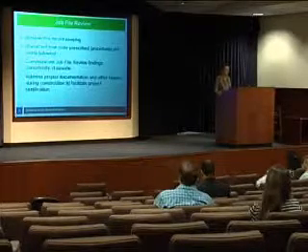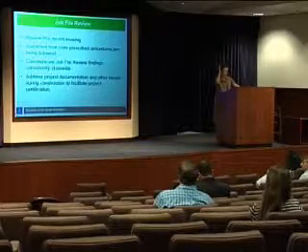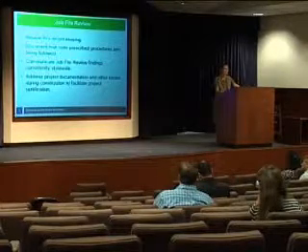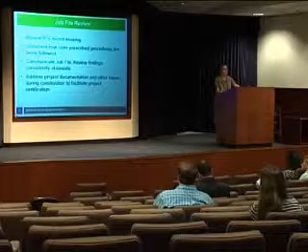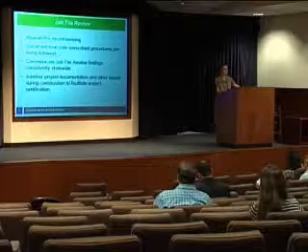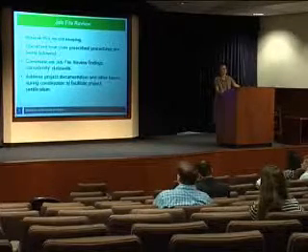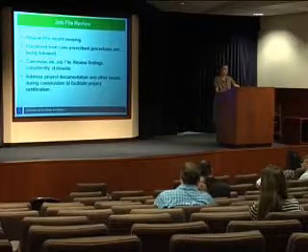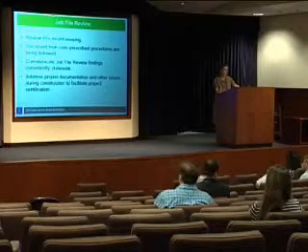Okay, so what we discovered as a result of the audit that DSA had is that a big issue for us that prevents projects from being certified at the end of construction is poor documentation. And in analyzing our processes, we determined that the job file that the project inspector maintains at the job site is one of the key areas where documentation should be strengthened.